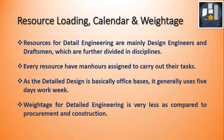Detailed engineering is essentially office-based and generally uses a five-day work week with eight hours per day. This is unlike construction activity, which is site-based and may involve 48 hours over six days per week. Also, the weightage for detailed engineering is very small compared to procurement and construction — procurement and construction have much more weightage than detailed engineering.